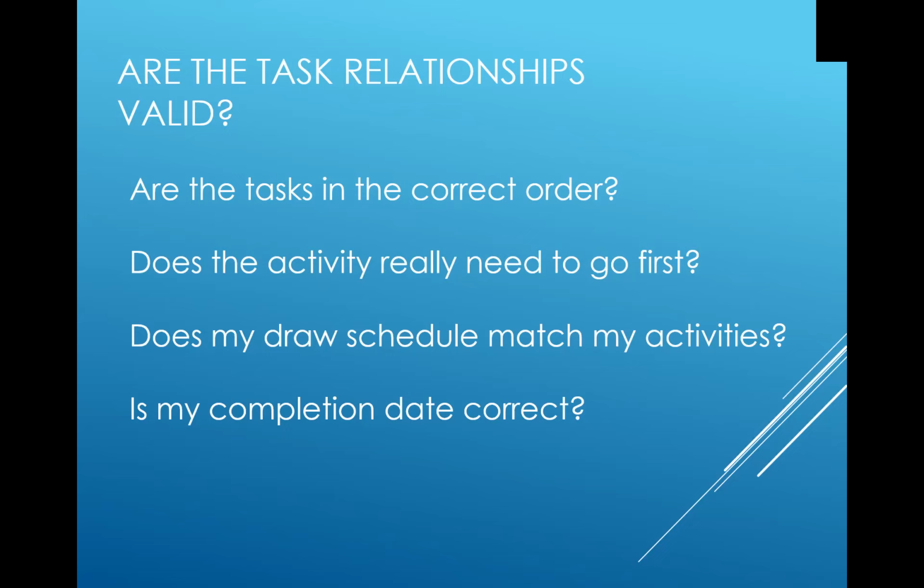Does my draw schedule match my activities? We talked about draw schedules. You want to make sure that the money you're bringing in is commensurate with the money you're paying out. You don't want to find yourself in a situation where you've scheduled all these tasks, paid for all of them, but you don't have any money coming in. So you need to make sure your draw schedule matches your activities, so you have an even flow of cash coming in and going out.